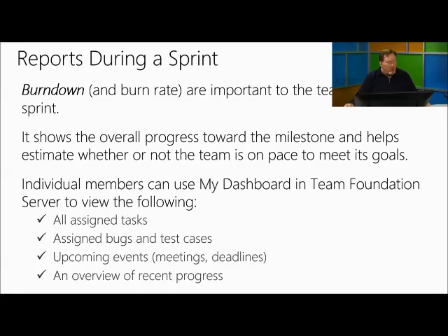So your burn down reports are important to the team during the sprint. It shows the overall progress towards the milestones and helps estimate whether the team is either on or off pace for the project. Individual members can also use My Dashboard in Team Foundation Server to view what their assigned tasks are, what their assigned bugs are. It's a pretty comprehensive tool when you think about this from a tester or from a developer perspective as being the end user for that tool. Also, upcoming events, meetings, and deadlines, and also an overview of the recent progress on certain activities.